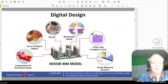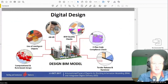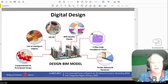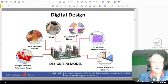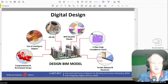Looking at digital design, these are examples of how BIM can be used — computational design, intelligent objects for clash analysis, AR and VR for visualization, quality control checks, code compliance checks, and tender release in handover. But here's the first problem: when these models are built by the architects, they're built for the architect's purpose, not for construction. When we try to use them for doing quantities, we often find they're not detailed enough — they're perfectly okay for demonstrating a design, but they're not buildable.